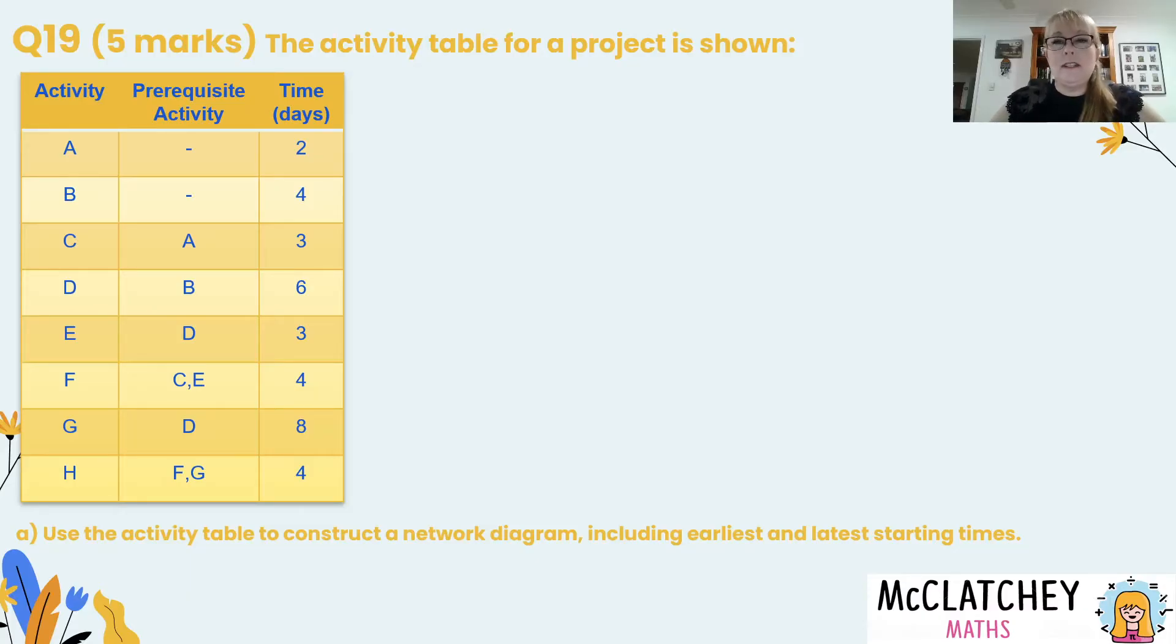We've been asked to use this table to construct a network diagram including our earliest and latest starting times. That means we need to build the diagram and then forward and backward scan. So let's start with our first activities that don't have a prerequisite. That's activities A and B.